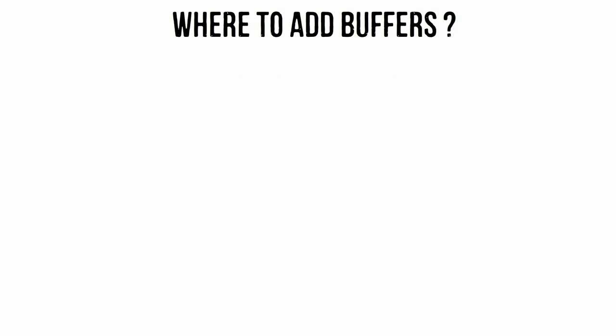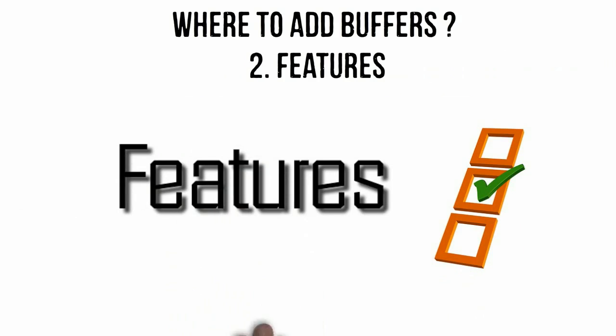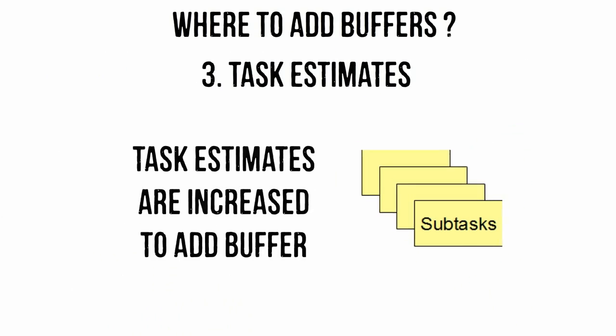2. Features, usually estimated in story points, are estimated higher where there is uncertainty. 3. Task estimates, usually estimated in hours up to no more than a day, are usually increased to allow for known impediments.